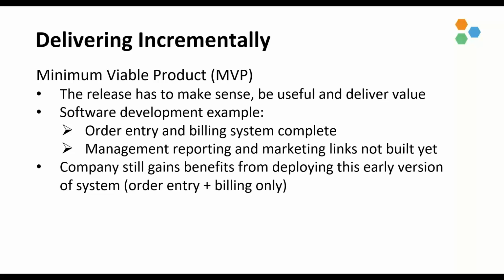So to summarize what we're talking about here, the incremental release can allow for some ROI, some return on investment, while the team develops the remaining functionality. And for the specific example on this slide, it also provides an opportunity to field test the order entry and billing system. Right? That's another advantage.